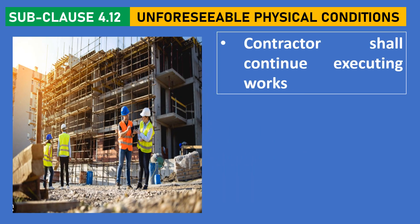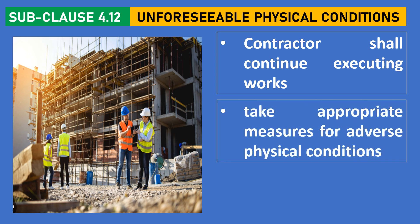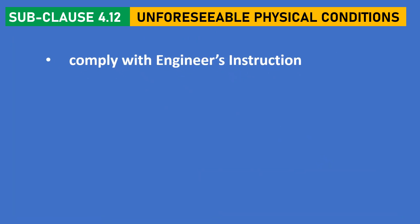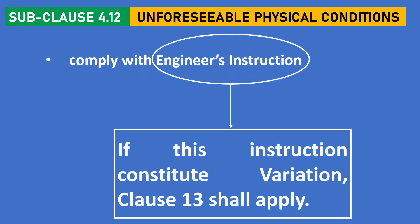The contractor, meanwhile, shall continue execution of work, take all appropriate measures for the adverse physical conditions, and comply with the engineer's instructions. These engineer's instructions, if they constitute a variation, Clause 13 shall apply.